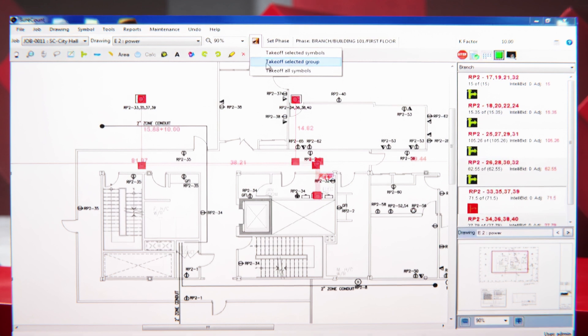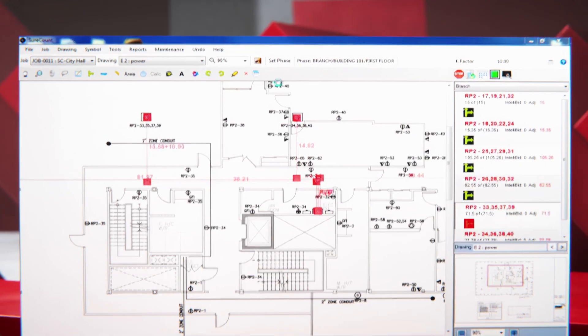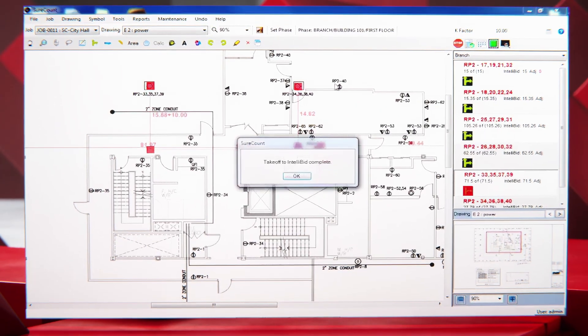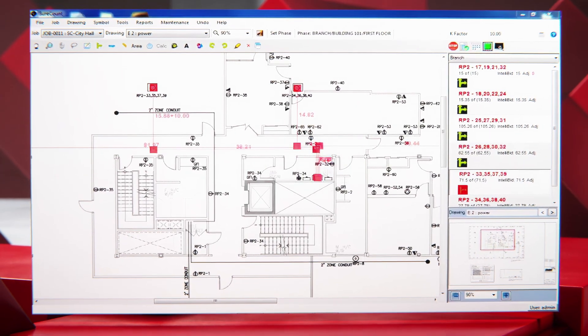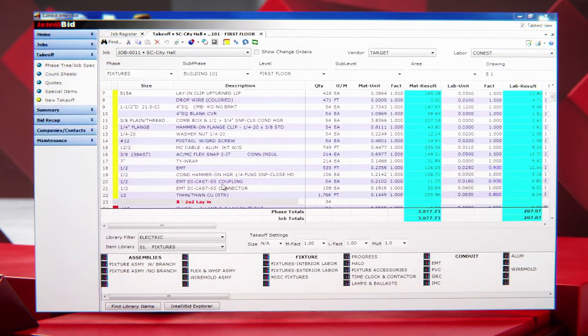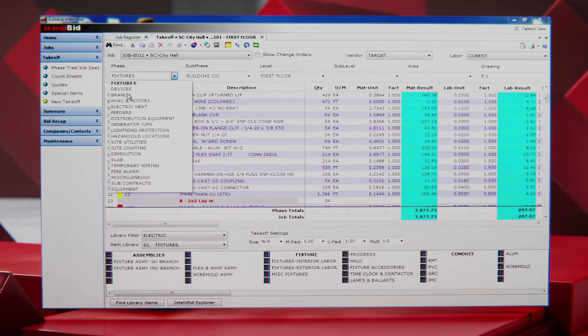Direct Takeoff from SureCount to IntelliBID optimizes your workflow and keeps you organized by assigning material and labor during takeoff in SureCount, then syncing drawings and phases with IntelliBID.